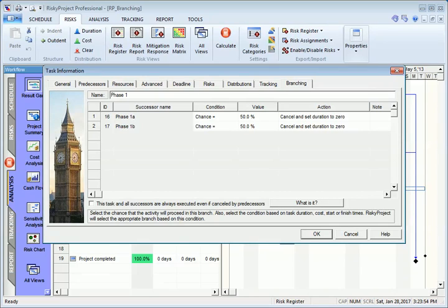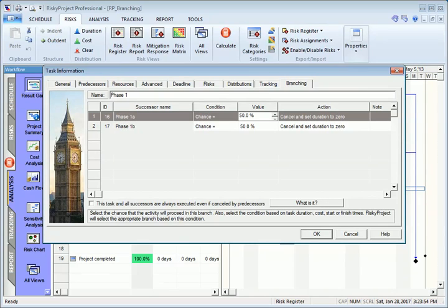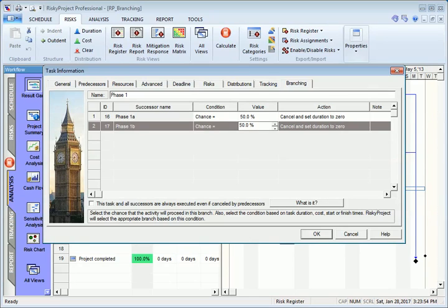Select a probability for each branch. If you specify chance equals 50%, this means that the branch will be executed with a probability of 50%.